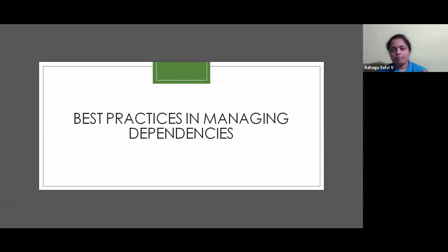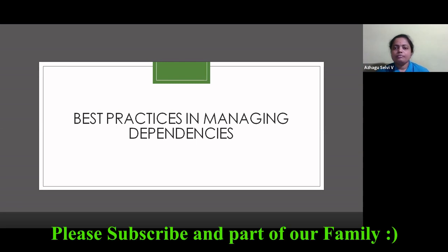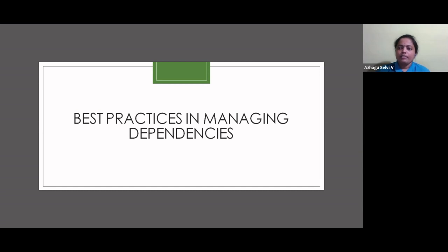But now as a Scrum Master, I am giving the update at the end of the daily stand-up meeting. No, this is not going to be completed in another 2 days. The reason being, the design team has other priority work. They have not yet started working on this item. Now, the product owner should try to reprioritize whatever is already planned. Okay, so this item is not going to be part of the upcoming sprint backlog.